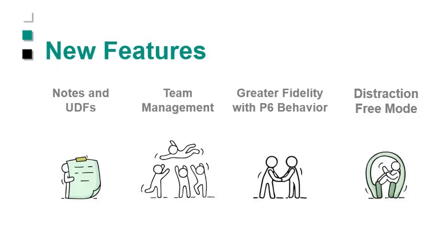And then, as I already touched on, the different types of updating. Now, you may not have such complicated updating. Lots of people just use duration, but some of our clients use physical with steps. Some use units with their resources. So we'll show you all those different aspects as the more complicated, more full-fledged kind of updating that you can do in the system.